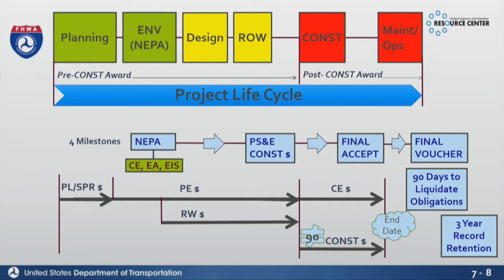That's the other decision-making factor, is after right-of-way, we're ready to go to construction. So you should have a plan, specs, and estimates document to move forward with construction. And you have to get approval from Federal Highway Administration to move to construction.